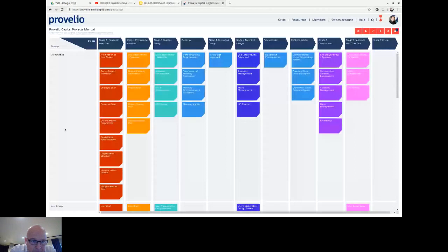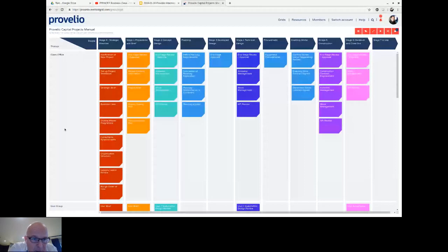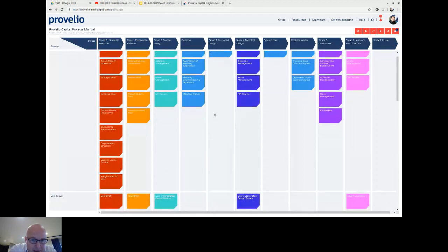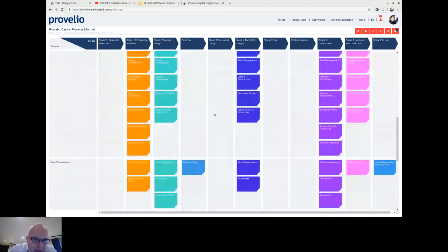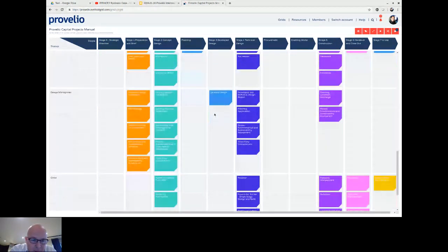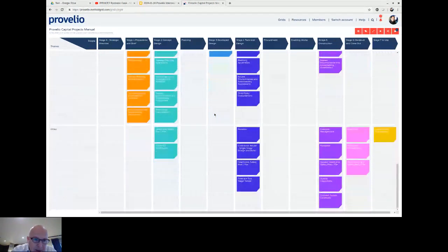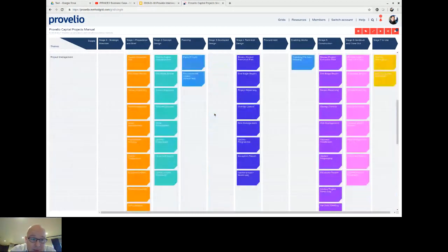And then we will have an away day with the team, maybe once a quarter, every 3 or 4 months, and this would be one of the topics that we would run through. Have people working in learning groups or focus groups, where we might say, well, what has anyone learned in the last X months about this? We can tie it into our lessons learned log, so any of the lessons that drop out of projects can then drop into this. So all those sources where you can find information and useful feedback, we grab those reports, and then they've got somewhere to go.